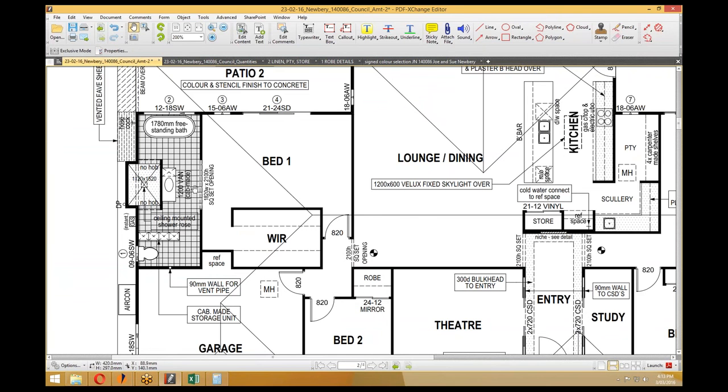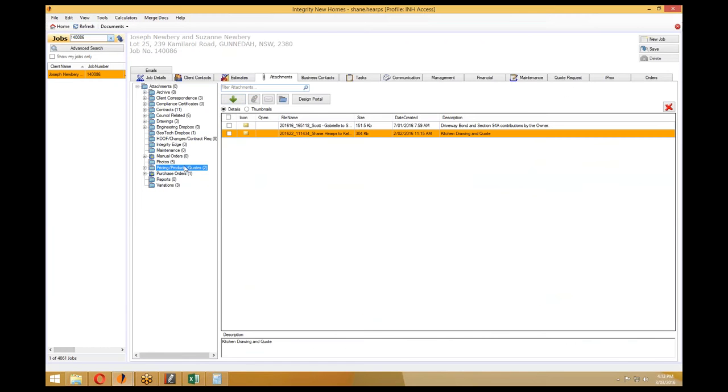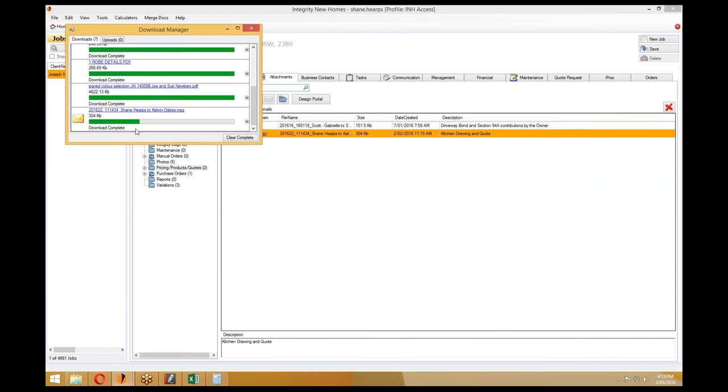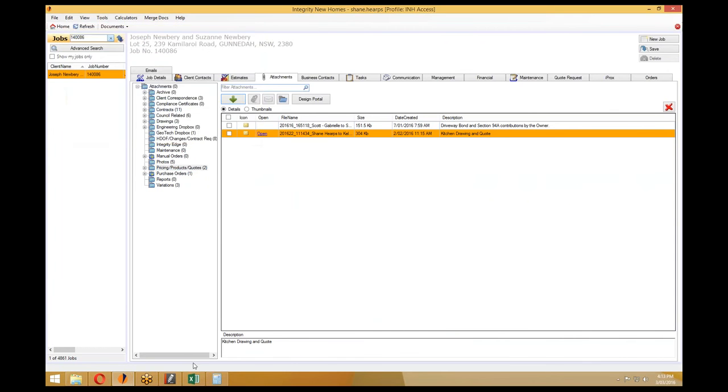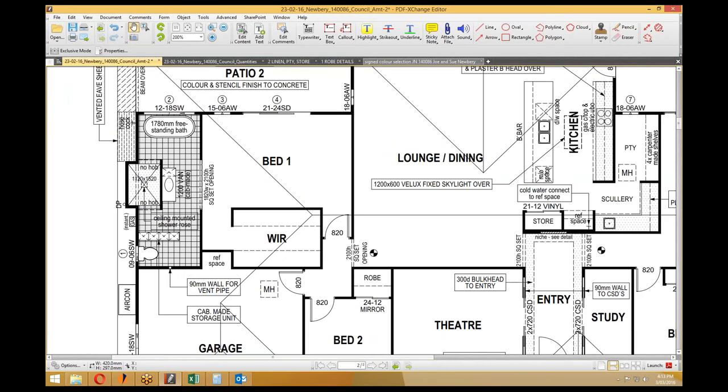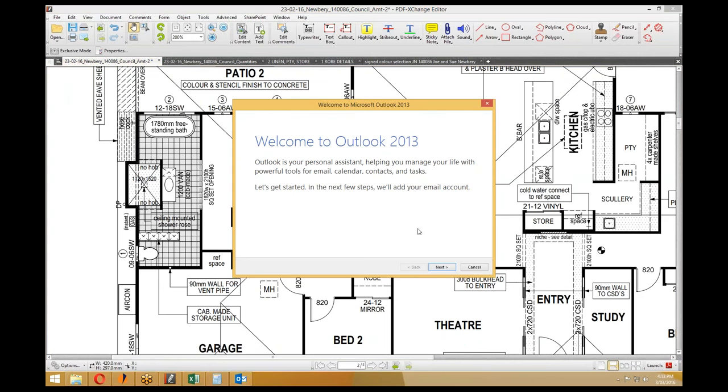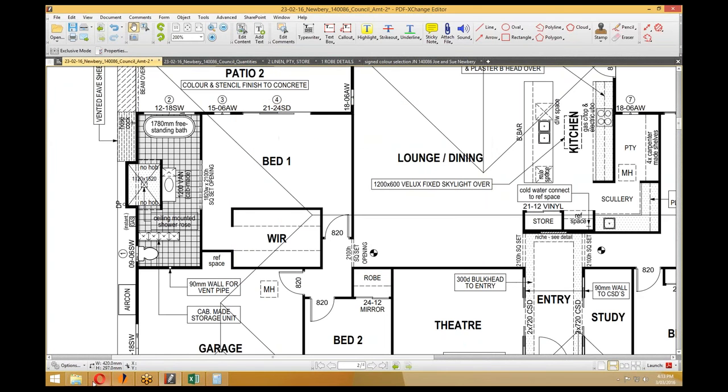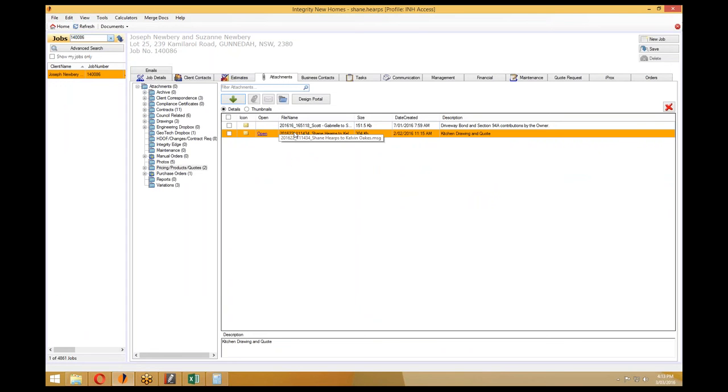We have the vanity, which we don't have a design on yet, I'd imagine. We can have a quick look. Oh, no, we actually do. So that'll give us a feel for what the general height of the vanity is, and our standard mirror above is always, I don't have Outlook set up on this machine. So our standard vanities are about 600 high, so I'll be conservative and just only do a 500 deduction. And then we have a 900 mil high mirror above.